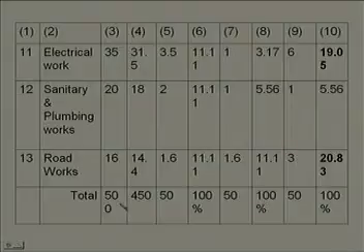Now, when you come to the last row of this table, you find that total bid price is 500, total cost for the contractor is 450. So, the net margin or net profit is 50 lakhs. For all the items, markup percentage is given as 100% and markup amount is 50 lakhs. Now, in all these 3 cases, whether you are doing uniform loading, front loading or back loading, the total margin that you are making is the same, 50 lakhs, but the timing changes.